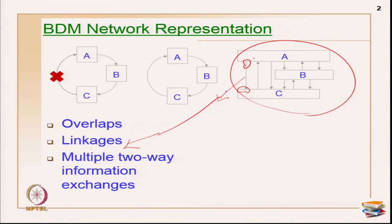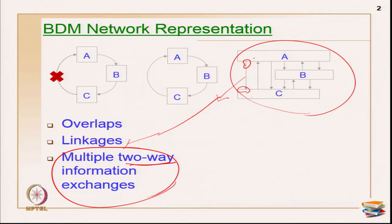If you want to give a proper definition for linkages — one is multiple: you can represent so many relationships or information exchanges among any two activities. Then it is also two-way: it is not like I am only having relationships in one direction. I could actually represent all the relationships between any two activities. I am actually having two-way communication flows — A can also give information to B, and B can also give information to A. So it is multiple and also two-way information exchanges.